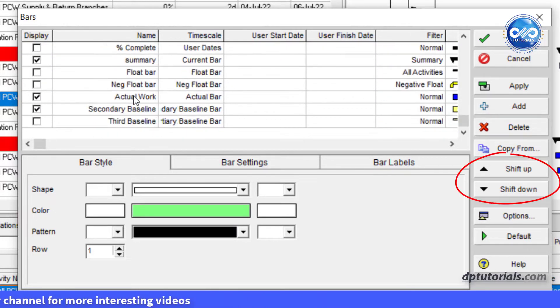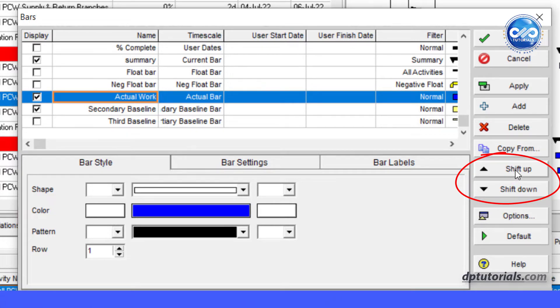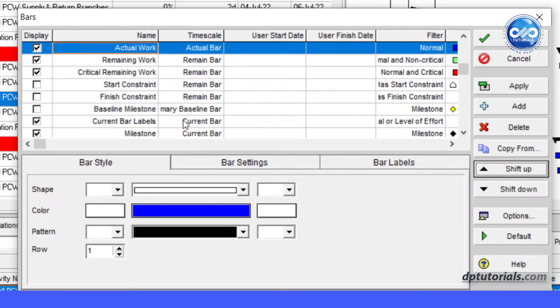Now using the shift up and shift down buttons, let us bring the actual bars and remaining bars to the top above the baseline bar.